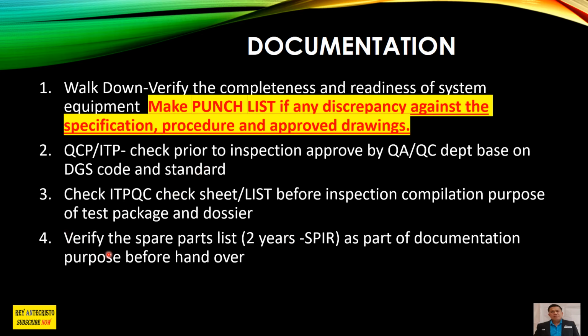This is related to all of the spare parts. For example, I will give you an example. Power generator. If you have an equipment of power generator, all of the consumables, as a cataloging engineer, as a spare parts engineer, you need to check all of the consumables and what spare parts are required, relevant, and necessary, that we can change after 2 years.